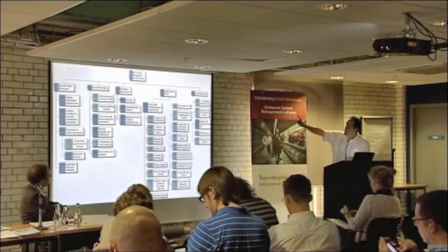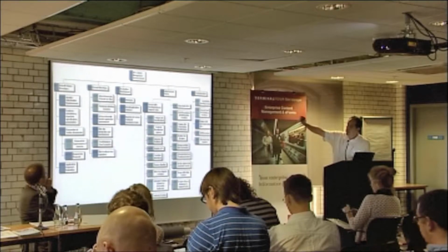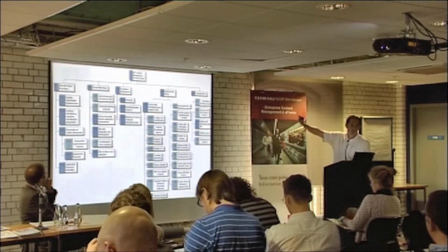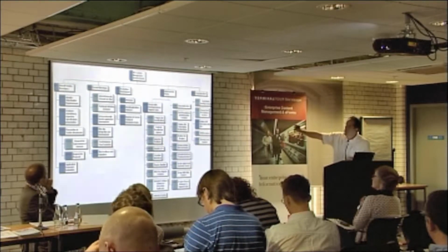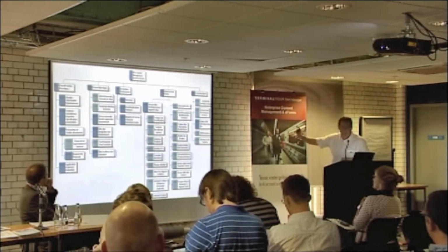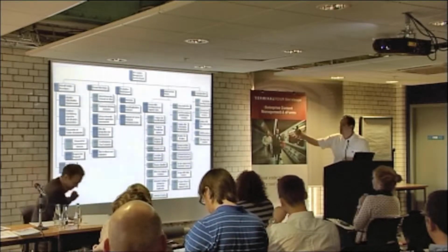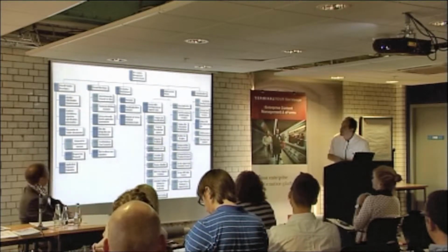Just very quickly, the branches across the top represent the major work strands of the project, then broken down in turn into discrete areas of work packages, and then down into actual tasks for the project as well. I have to confess, I didn't have this at the start. I did this as part of a course I did after the fact. It's a bit like one I didn't have prepared earlier, I suppose.